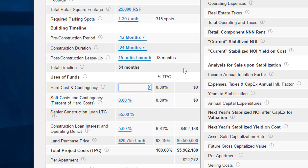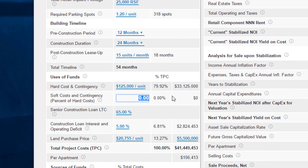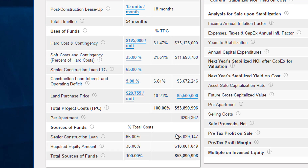On a preliminary basis I'll put in $125,000 in hard costs per residential unit, totaling $33.125 million, and 35% of hard costs for soft costs, bringing us to $11.6 million. I'll leave the cost of funds at 5%. The land price is already pre-populated at roughly 10% of total project cost, bringing the total to $53.9 million — roughly $200,000 per unit. Sources of funds are the 65% loan-to-cost senior construction loan and a residual equity of $18.8 million, or 35% of total development cost.